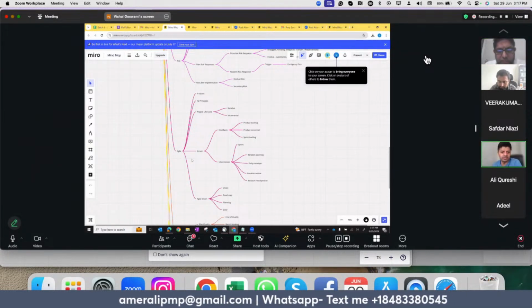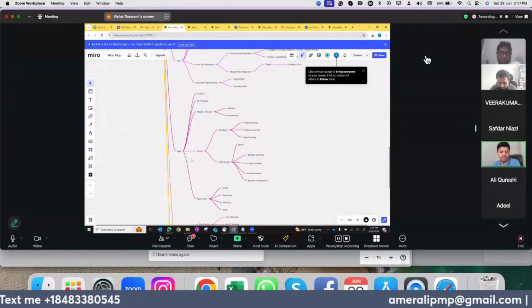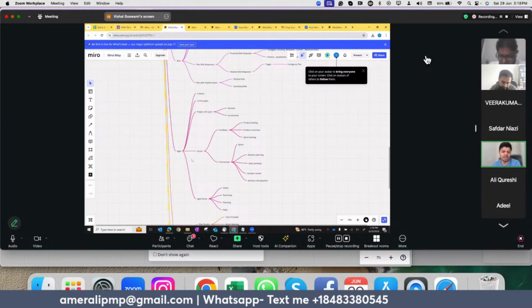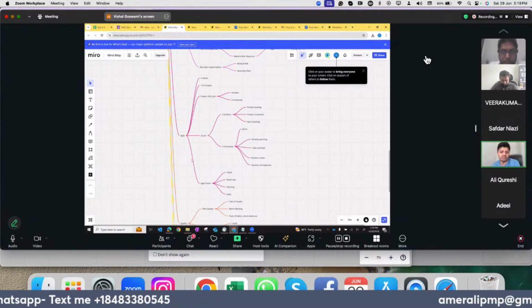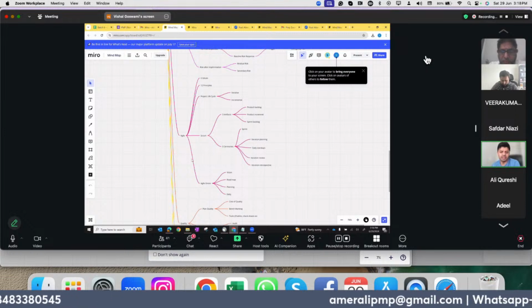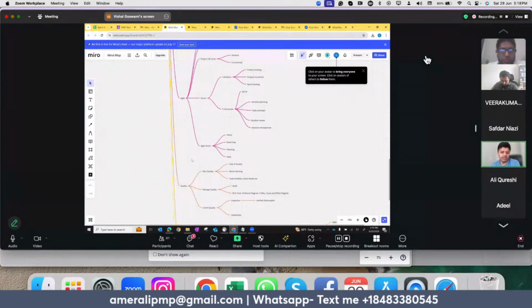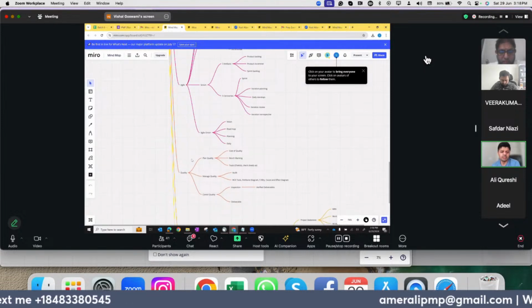Okay, Agile, we have 4 values and 12 principles. We didn't elaborate on that in our time, but there are different project life cycles within Agile, iterative as well as incremental. The main life cycle is Scrum, which is based on 3 artifacts: product backlog, product increment, and sprint backlog. There are 5 ceremonies: sprint, iteration planning, daily stand-ups, iteration review, and iteration retrospective. Within Agile, we also have the Agile Onion, which consists of vision, roadmap, planning, as well as daily.